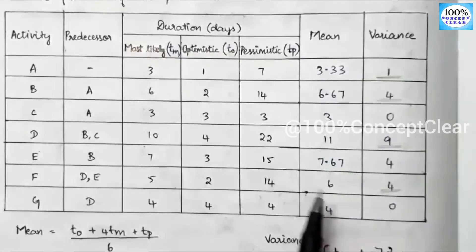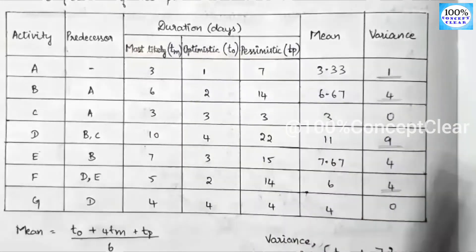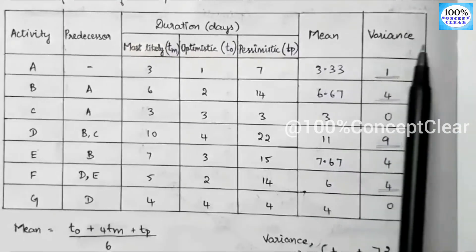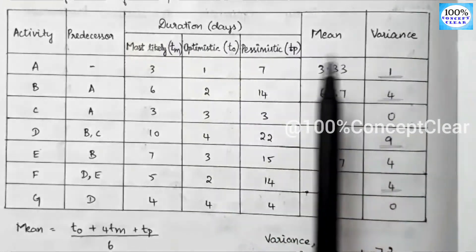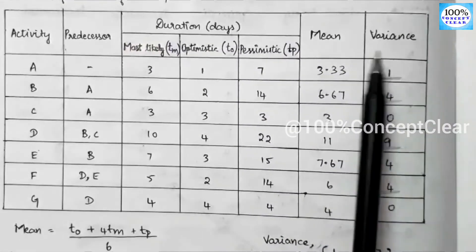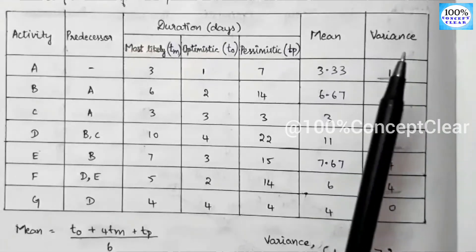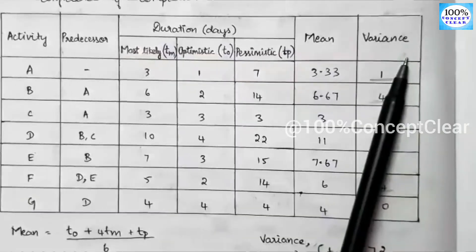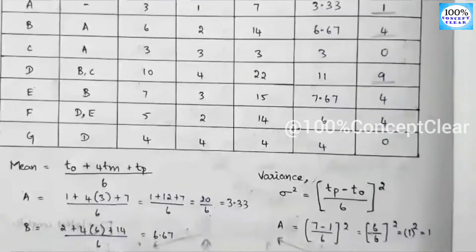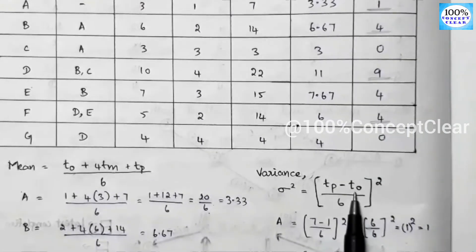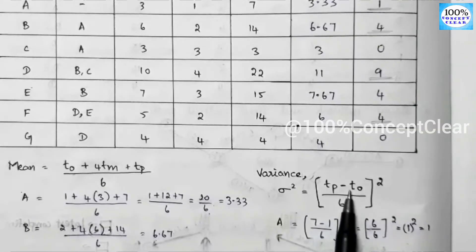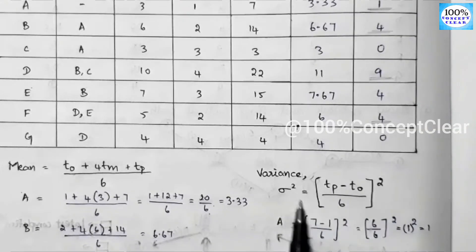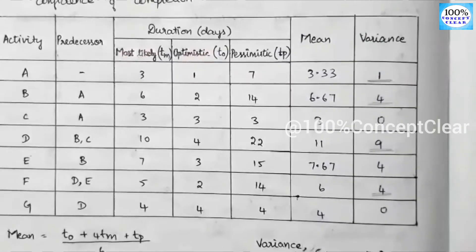We can also calculate the Variance value in PERT, which is used in network analysis or critical path probability calculations. The variance formula is: ((TP - TO) / 6)², i.e., pessimistic time minus optimistic time divided by 6, the whole squared. We calculate variance for all activities.